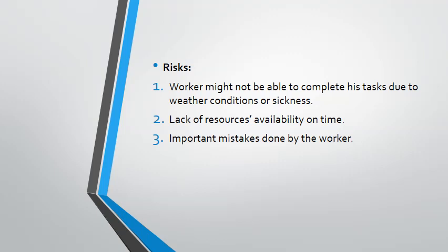Lack of resource availability on time. This will bring a delay to the project as well, but it will be contained by finding other providers, stores, or personnel, depending on what kind of resource is lacking.